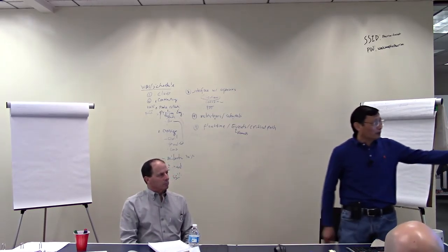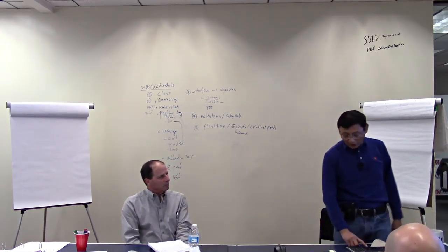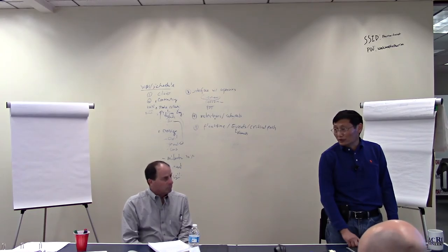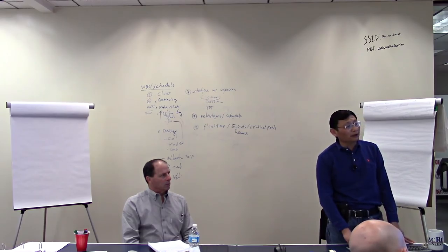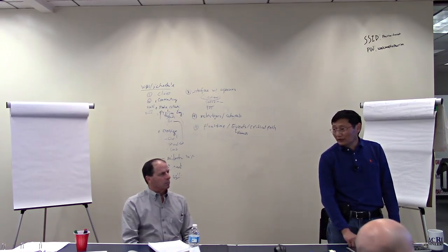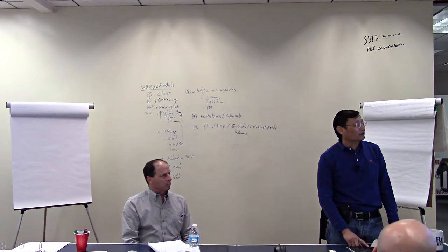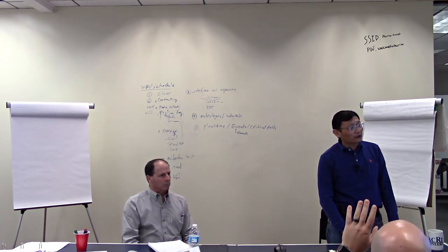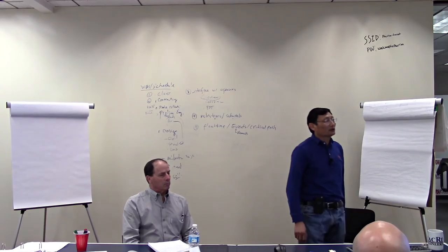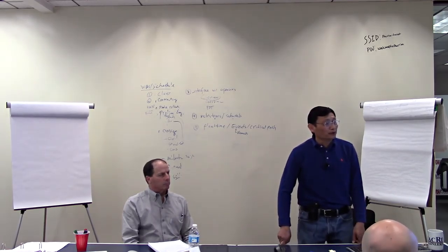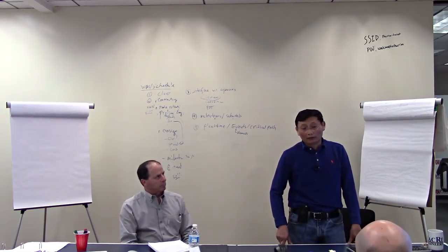So the next slide is progress report and monitoring. Some of this we already mentioned during the execution; it is very important to monitor and close. It's a project manager's job to stay on top of it. Weekly, for a larger project with a consultant, you have to have a weekly conference call to check in. Monthly PDT meetings for Caltrans, that's a must, you have to do that.